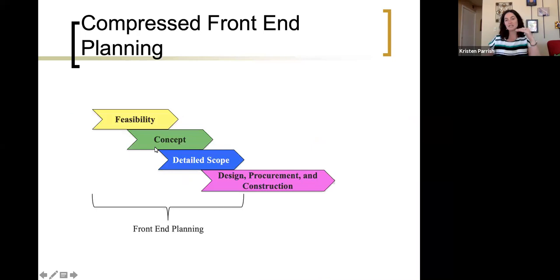What we found in recent research is that more and more projects are being fast-tracked or compressed. So the concept and detailed scoping are fairly overlapping, and then some of these scoping exercises will also overlap with design, procurement, and construction. So front-end planning really is all the way through until the end of detailed scope, regardless of what that comprises.